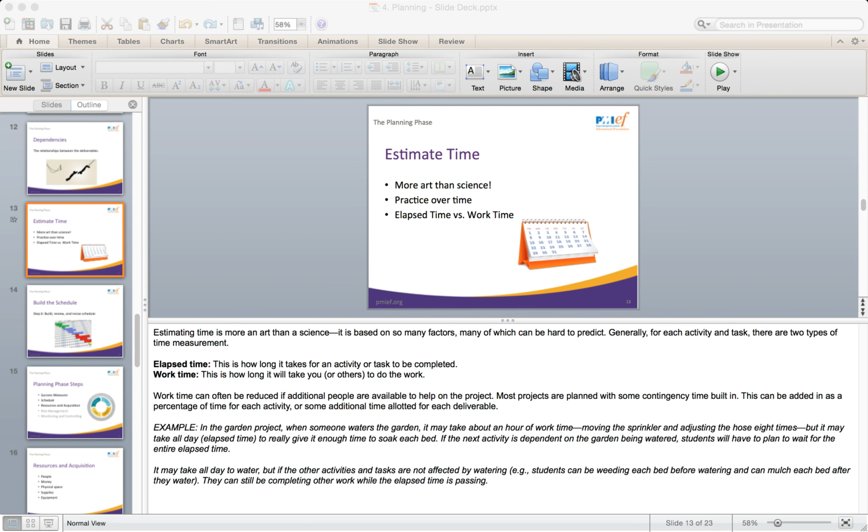How likely is it to happen? This can be characterized as a percentage or a ratio. It can be 50-50 chance, or as Linda used, high, medium, low. However, considering assigning a value will be part of determining how many resources should be put toward averting the negative event or outcome.